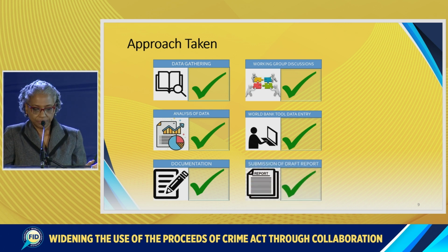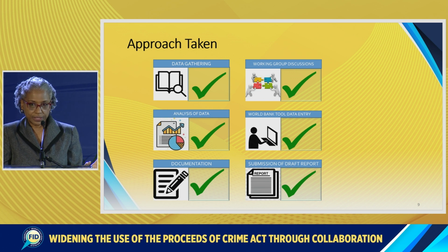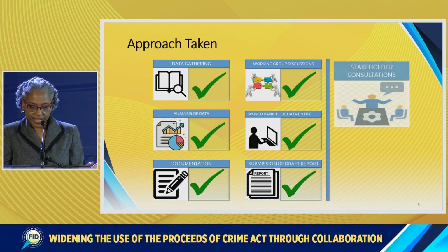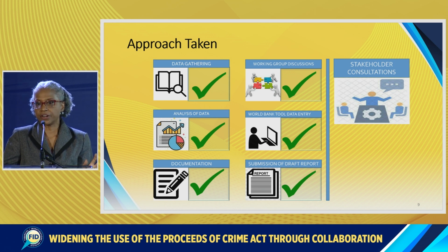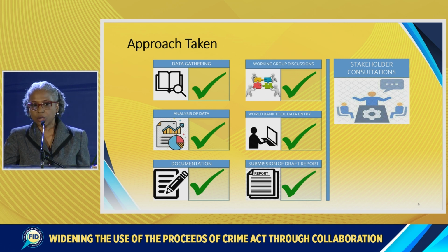Once that was done, we did the draft report. Then we had stakeholder consultations, and this is very important because this gives you an opportunity to reach out to the different sectors to get their point of view, to see if there's anything that needs to be taken into consideration. Is there something that we missed?